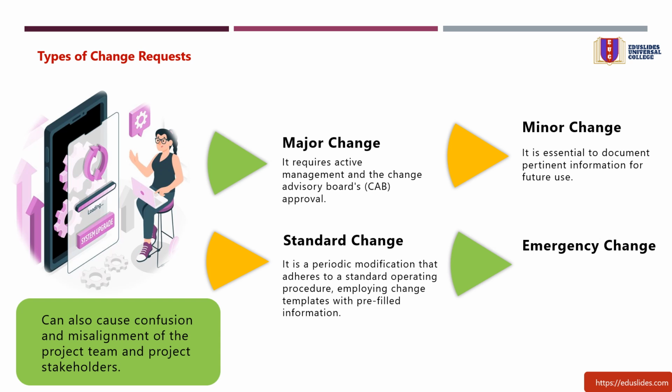4. Emergency change. Emergency changes are random disruptions that are important to resolve immediately. It manages change requests retroactively after implementing the system. It is crucial for the emergency CAB to comprehend the impact and manage approvals. Emergency changes necessitate a post-implementation review to identify potential future risks, and it is important to have detailed documentation to support post-change execution. Examples of an emergency change can include fixing a security breach or a server outage.